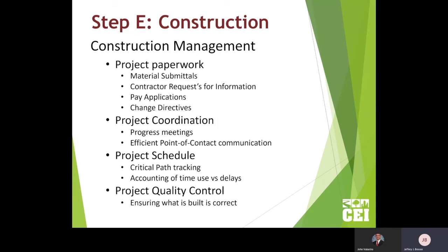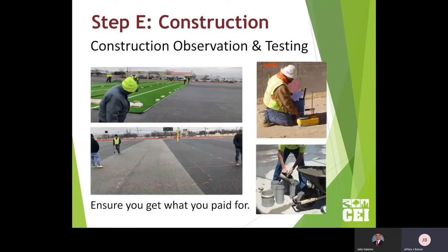for the community. But touching on the last one is quality control, ensuring what is being built is correct. Engineers, when we're tasked to do this work, we go out and check the work once a week on a regular basis. Whenever there's a milestone that's passed, it's our job to go perform a test, look, observe, inspect, make sure that what we're asking for is actually being done. Make sure that what we ordered is actually the right product.